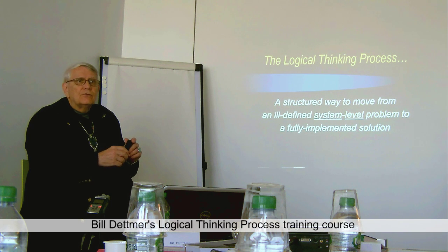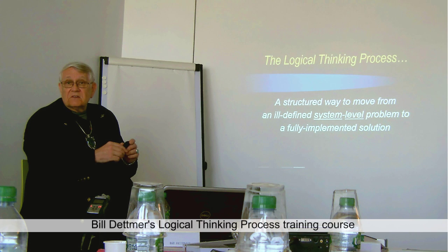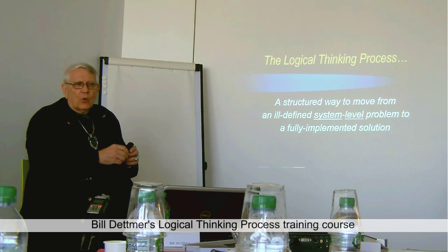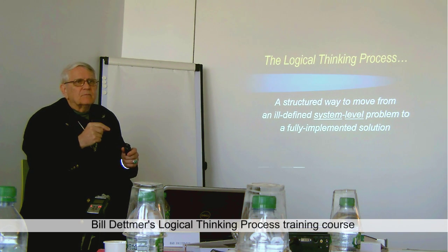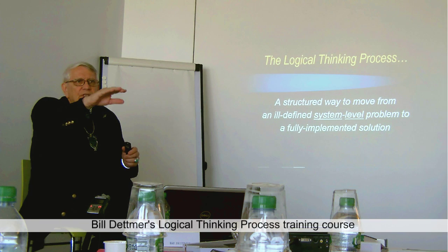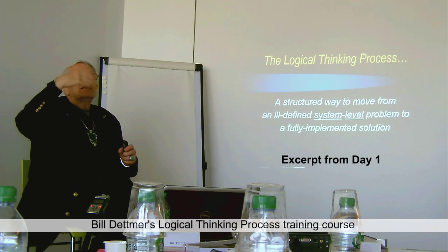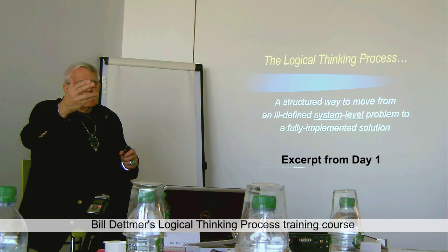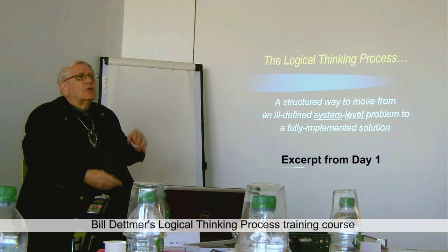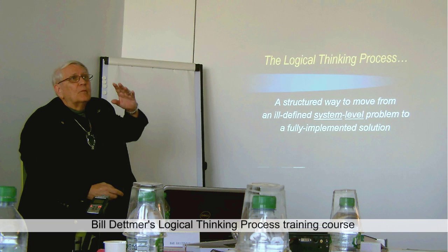So you have to use some fairly good intuition, knowledge, experience and understanding on your part to say, we can do the first 5 steps of this future reality tree in about 4 weeks. But this next step is going to take 6 months. Even if we put this in place, it will deliver that next outcome, but it will take 6 months to unfold.